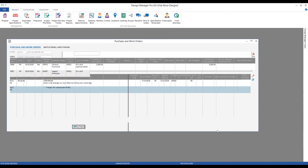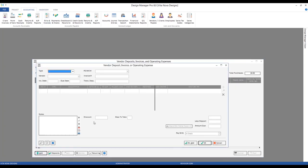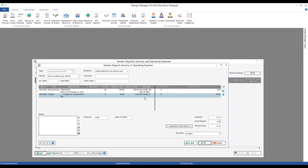Let's imagine we got the fabric quite some time ago and now receive a freight bill weeks or months later. We go back to Accounting > Bills and Invoices, click Add, and see the PO again. The fabric has been received and paid in full — Design Manager automatically recognizes we've recorded previous vendor invoices for it, since the cost to date matches the estimated cost exactly. It defaults the quantity and cost on this invoice to zero for the fabric, yet it knows there's $40 of freight on the purchase order with no cost so far, so it defaults that $40 for us.